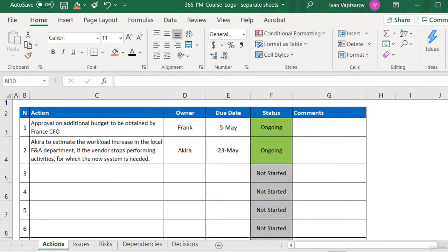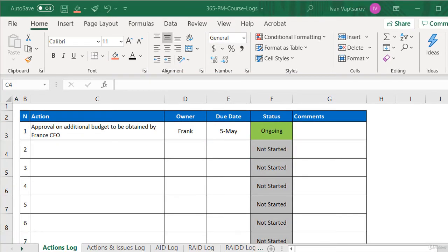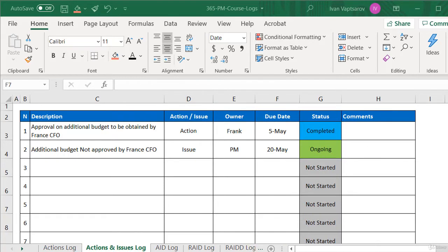Absolutely. So here is our extra advice on structuring your RAID log. One by one. Actions. This is a must. You need to have this in the reviewed format as a minimum. Same goes for the issues. These, however, we would keep in the same table, together with the actions. They can easily be logged in the same frame as they are similar enough.